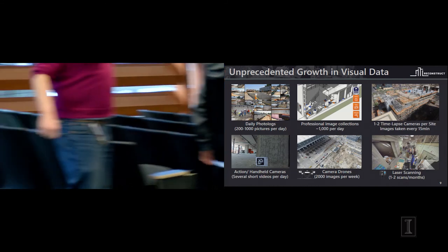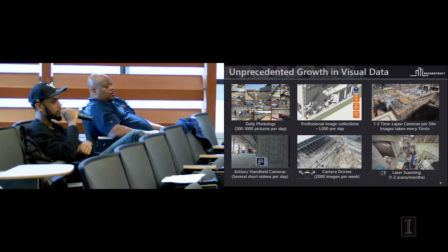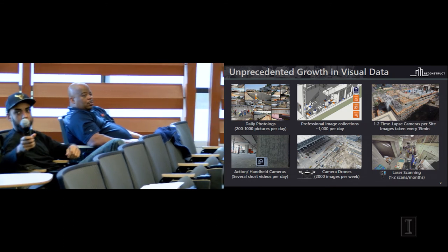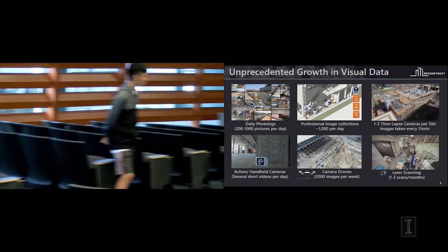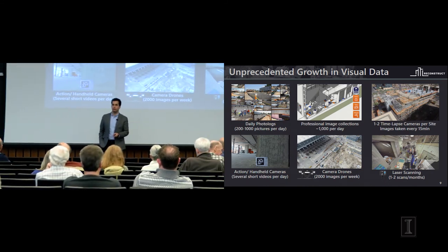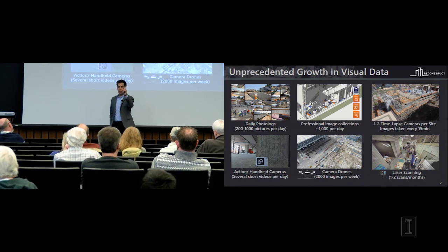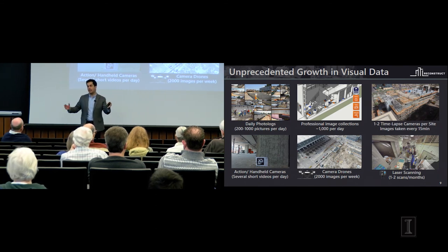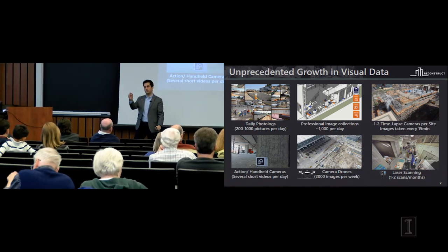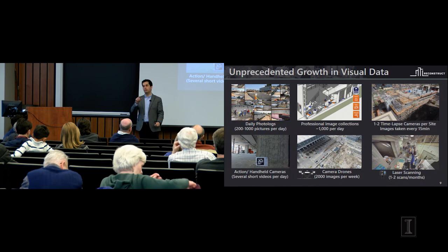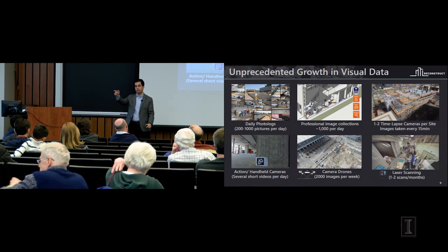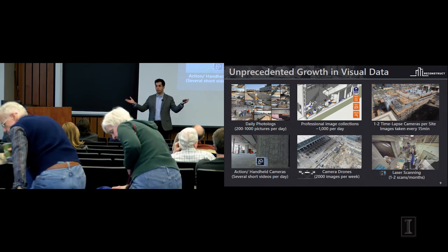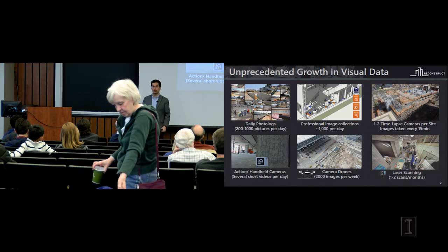I just wanted you to elaborate a little bit on the difference between 3D and 4D images. That's an excellent question. By 4D, I mean 3D that is generated over time. When we fly a drone every week, the data that gets captured generates one three-dimensional model. But we do this over time, which means every week there's one 3D model. We tie these models automatically together. So by changing your spectrum in time, you can dive from an image that belongs to last week to an image that belongs to the next week of the capture. So it's basically multiple 3D models captured over time, and they're all merged into one as 4D. That's an excellent point.